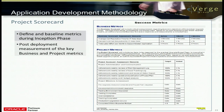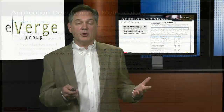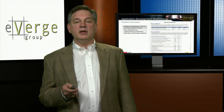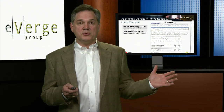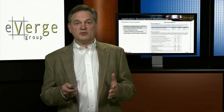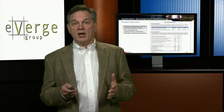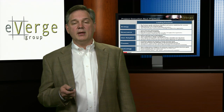In the inception phase, one of the things we do at the very beginning with a project charter is measure the business objectives of the project — not just the IT objectives, but the business objectives. What is this going to deliver for a CRM or BI project? Where we can go back to our customer and say eVerge did what we said we were going to do — or in most cases, even more so. We have a project scorecard developed in the inception phase, and we take the after picture once we go live and can measure that as a function of time.